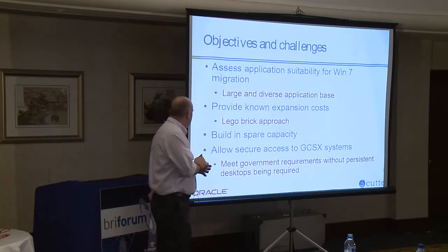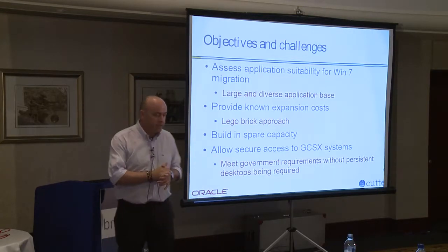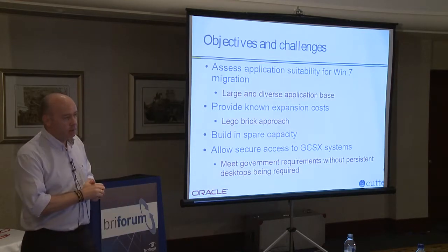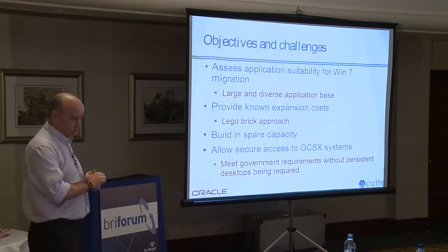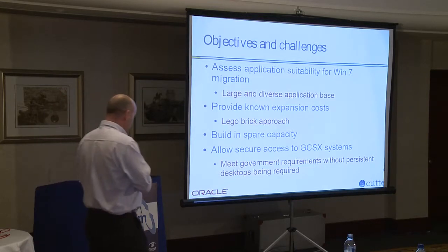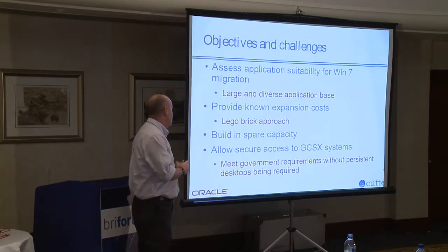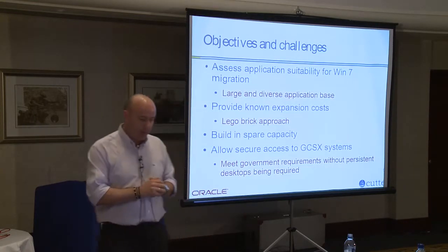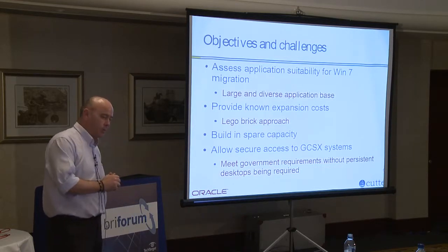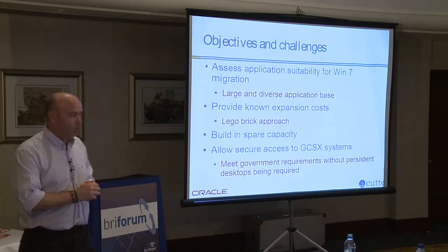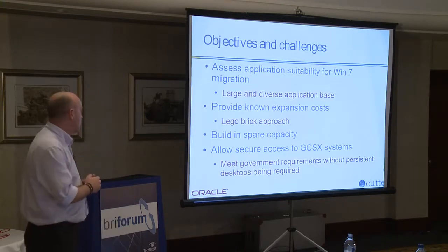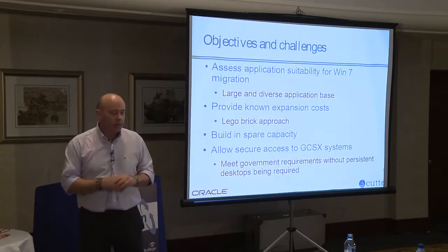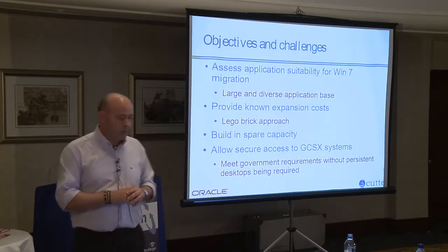Assess application suitability for Windows 7 migration. I've got a feeling this is still going to be going on in 6 months' time. We're on a phased rollout program with these guys. I think we're looking at about 50 to 80 users a day. And some of it is down to the fact that all the application side of things still haven't been tested. There's an awful lot of work still to be done there. And yes, there is technology out there that makes it easier. Yes, we are using some of it, but it's still a long and laborious process. AppV is being used quite heavily, as we'll see later on. And there are challenges based around that.